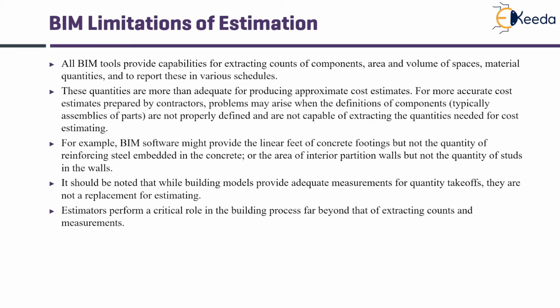But the quantity takeoff from a BIM model has limited applications. The quantity takeoffs of BIM are not admissible for RA bills. Though the BIM tools have the capability of extracting various details of area and volume, they cannot provide finer details in different units.